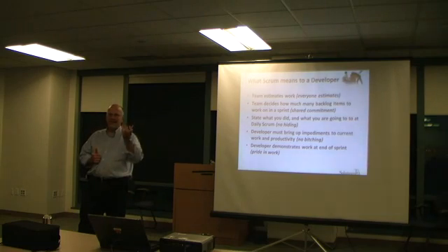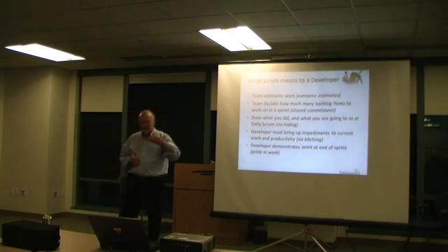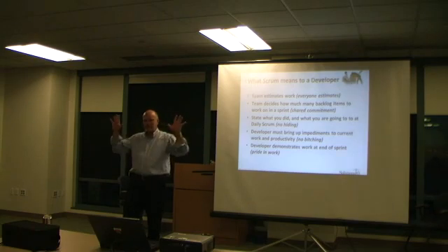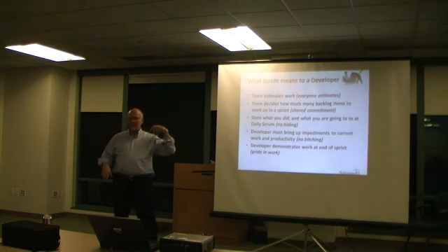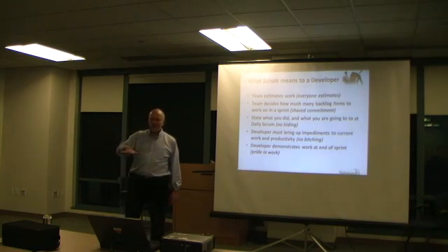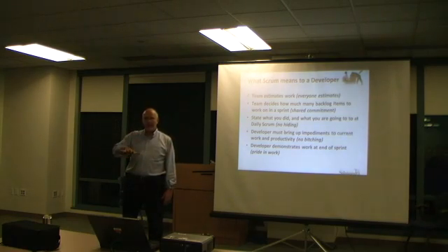To the degree they can't, there's Jeff Sutherland, who came and talked to us a couple years ago, and he had the story of if you have a rock star that delivers 5x of a normal human being, right? And, let me see if I get my story right, 6 people on the team. That guy plus 5 others. Together, they deliver his 5 and their 5, so they deliver 10 in total. So 10 total points. You take the rock star off, and those people can double. They do better. They're not ashamed, they're not beat down by the expertise of this guy telling them that they're stupid. They actually can deliver a little bit more, and they go from 1 to 2. Now you've delivered the same amount without the rock star.